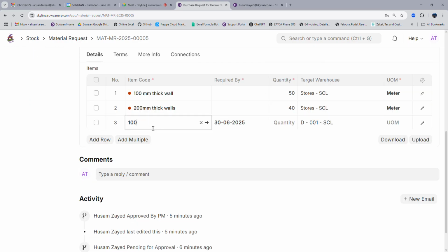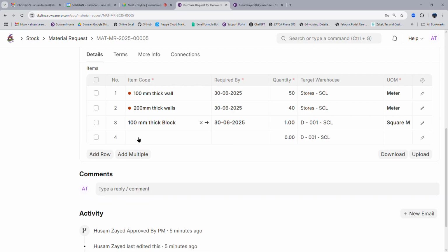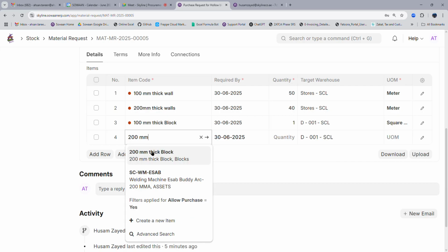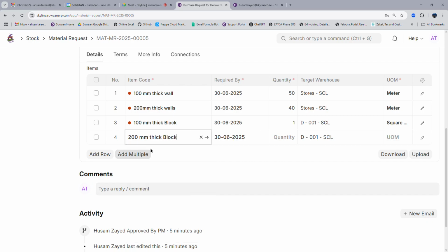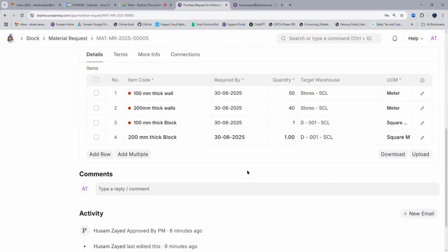And you can pull it up one by one as well, like this. You can search, and you see the same item will start appearing, which you can pick and choose one by one like this. But since it is already created as a bundle at the time of the BOQ by the quantity surveyor department, things are there. You just need to have at least the BOQ details so that you can start pulling up all the information which the quantity surveyor department has already established.